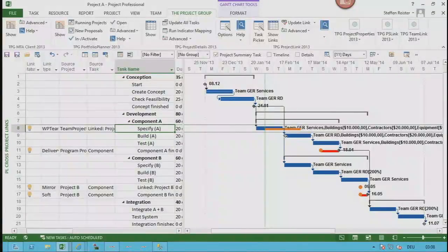It's on an existing task, writing date information hard into the calculated fields to shift the task. Some customers want to have that. And it's harder than a real dependency. The real dependency has a separate line with a dependency to my task. And the hard link is not a separate line. It's just data which is written into the existing task. A hard constraint, very hard constraint, yeah.